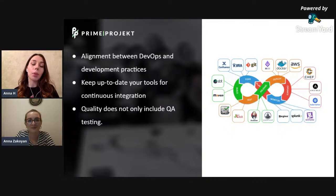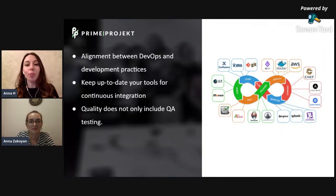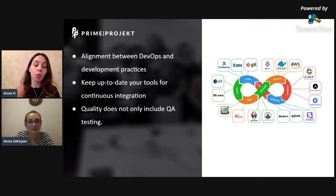And our tip here is to make sure always that your development lifecycle is aligned with your product delivery strategy. If you need to validate the work that you're doing in a sprint, make sure that you have a solid deployment structure. Make sure that you have environments to be able to test and approve the functionality before it reaches your users in production, and to organize demonstrations and reviews for your stakeholders before you release the features. If you used to make production updates, for example, once in a couple of months, and now you have to do these updates every 2 weeks, you need to make sure that your development team can perform those updates independently. And ideally, it would be great to have a dedicated DevOps engineer for your team as well.